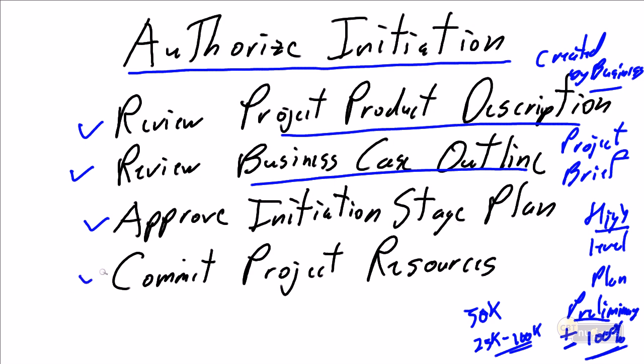And we're going to begin to commit the project resources, most specifically the project manager. We're going to get Steve or yourself assigned to this project, and we're going to proceed to narrow down that plus or minus 100% and make it a plus or minus even a 50% as we begin to develop better, more realistic, more thought out plans for completing the project.